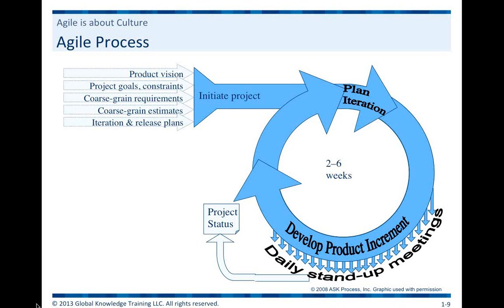can continue working. As we continue on, you'll see in this animation that we release something of value every 2 to 6 weeks. Now, if it's an 8-week cycle, then it's an 8-week cycle. But every cycle, something usable for the customer gets released. And this is a core tenet or core principle of any Agile process. And this will be true of our use cases as well.